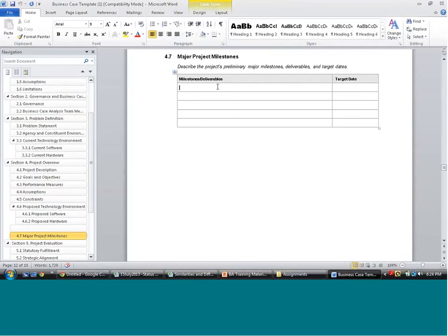What are the milestones? Is completion of requirements phase deemed as a milestone? Is completion of the approvals of requirements artifact deemed as completion of requirements phase? Or is completion of design deemed as another milestone? Or would you like to have sign off on the design specification? Then would you consider it as a milestone? So different organizations may have different tolerance levels, different processes. So identify all the milestones and establish a high-level target date.